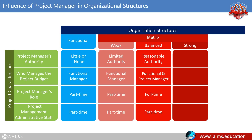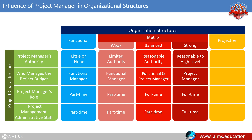In a strong matrix, the project manager has a reasonable to high level of power, manages the project budget, holds a full-time role, and has full-time administrative staff. In a projectized organization structure, the project manager holds the highest authority and manages the project budget, supported by full-time administrative staff.